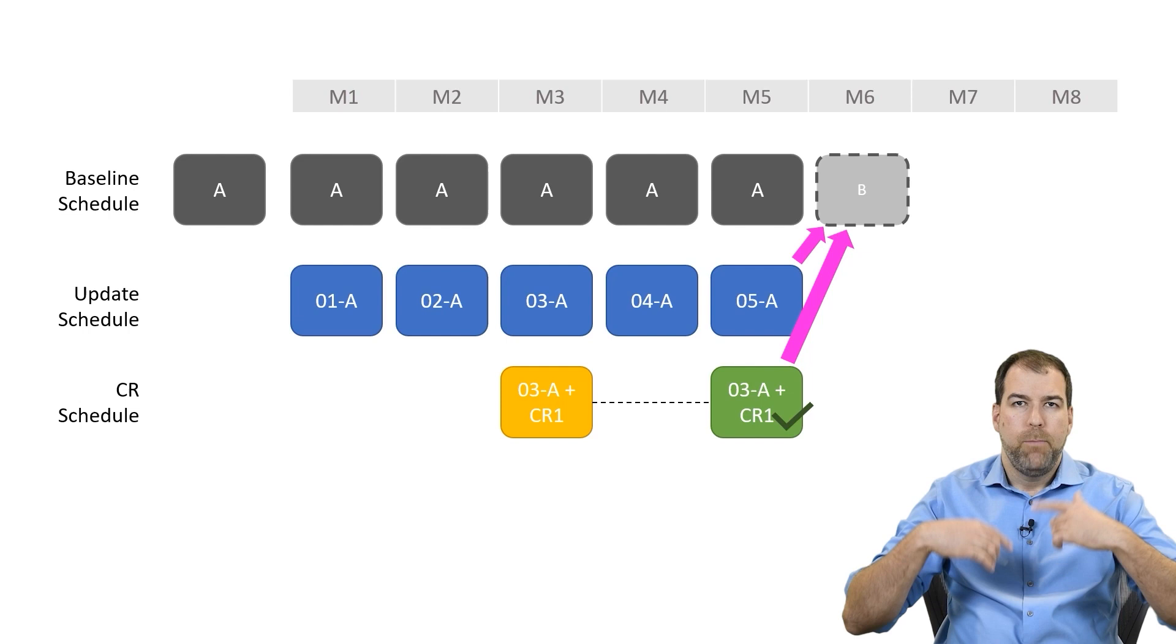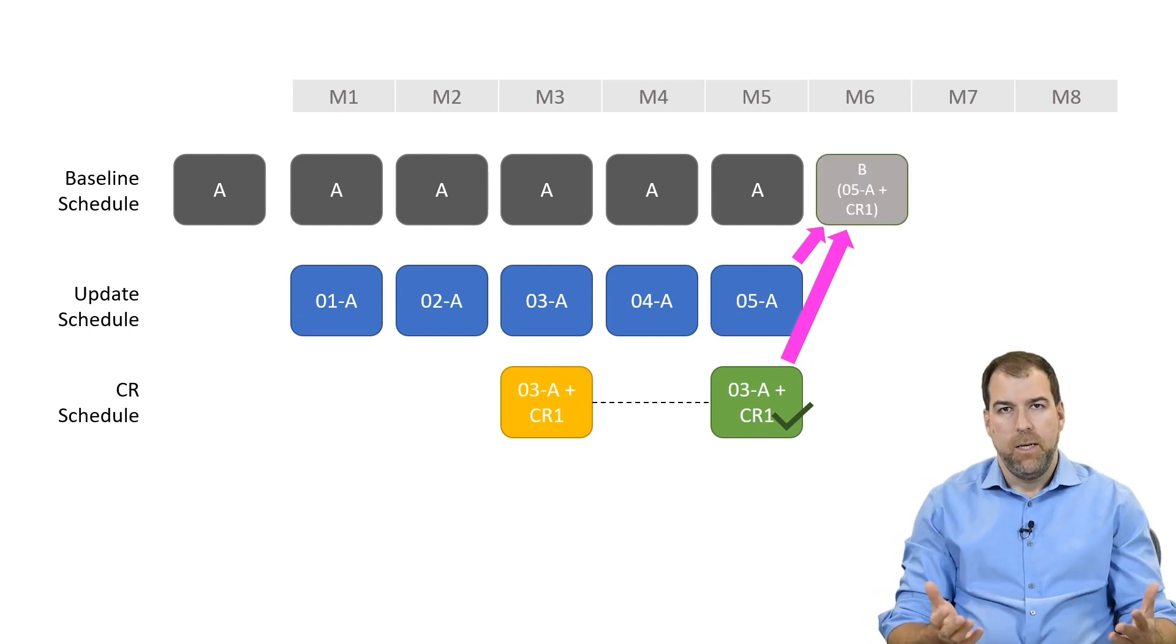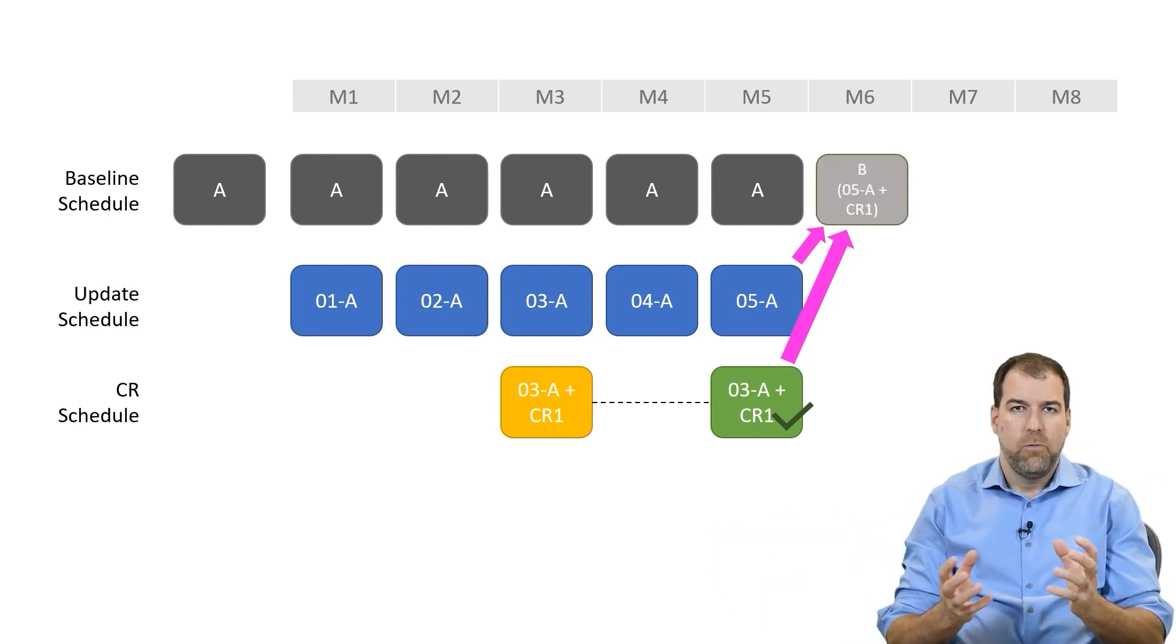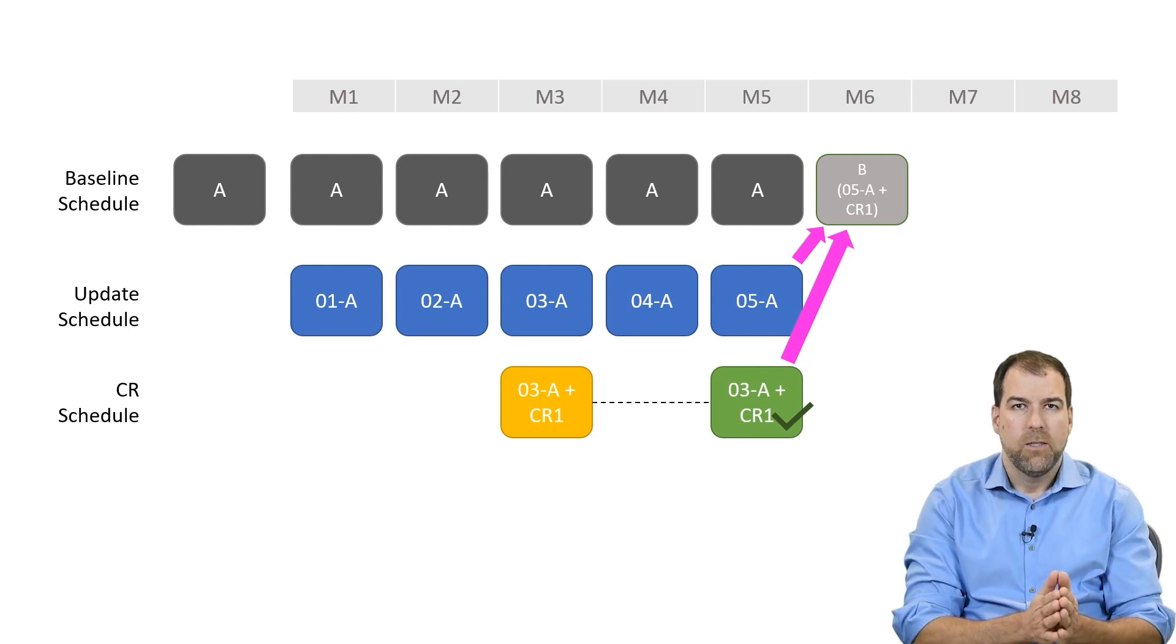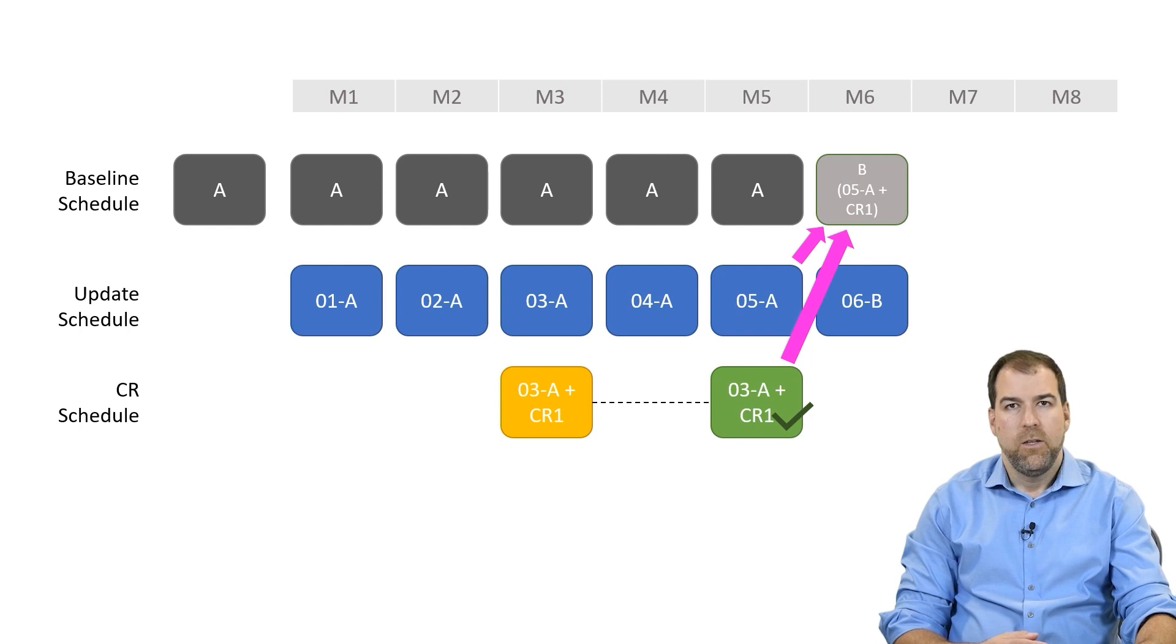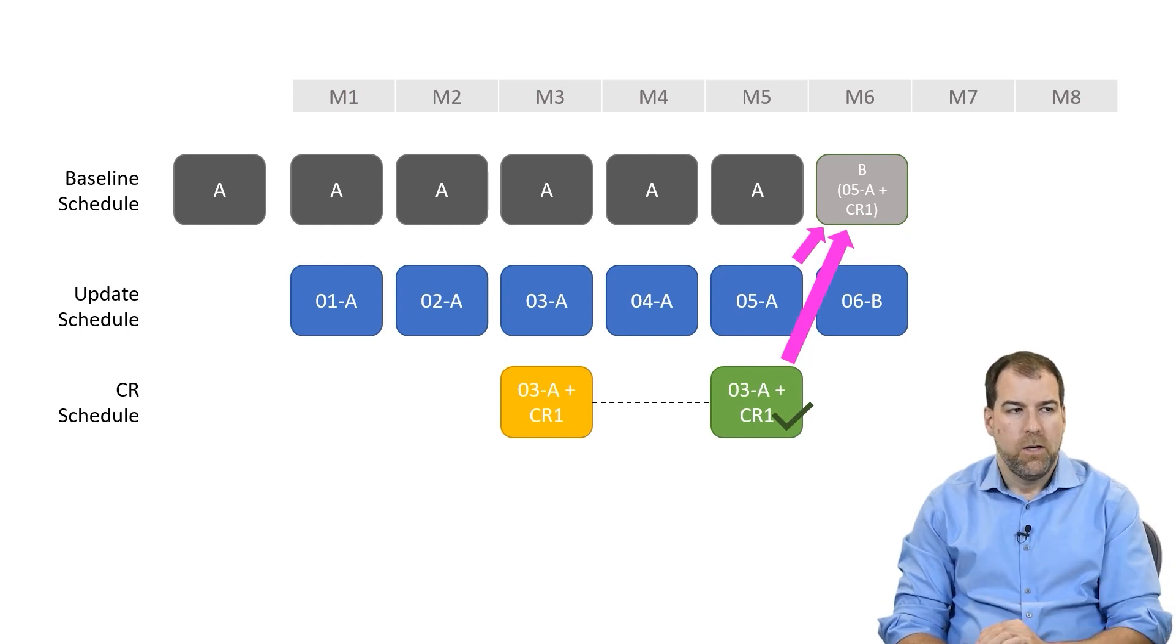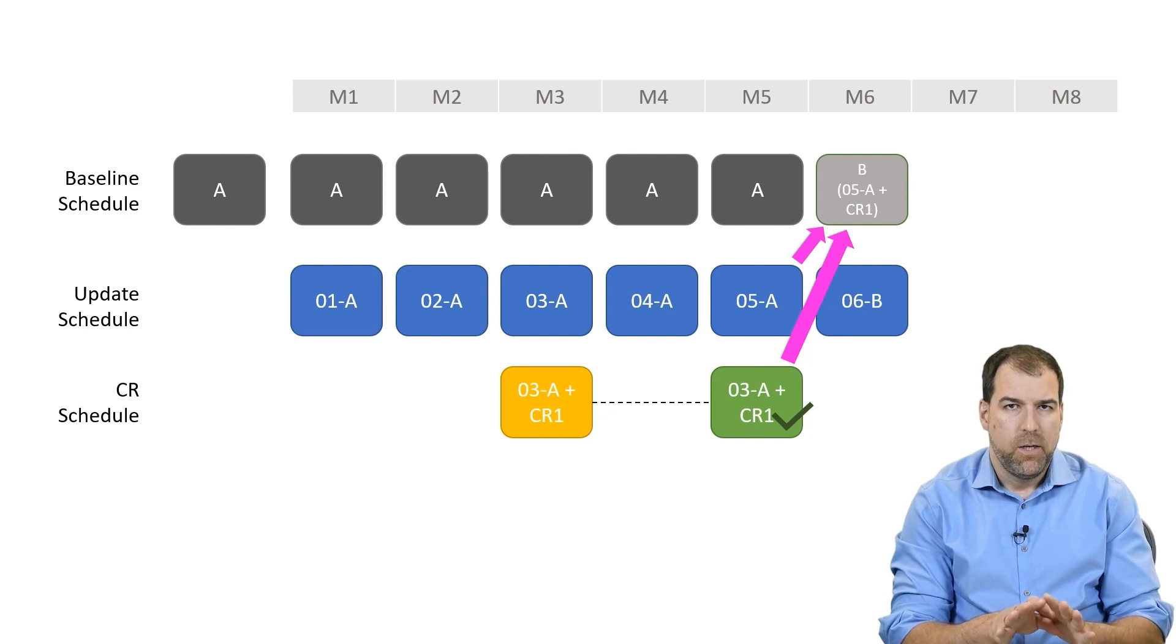We re-baseline that, and that becomes our baseline B. So we combine those two, baseline B. And now, with a re-baseline, we can continue moving forward into our scheduling process doing 06, 07.